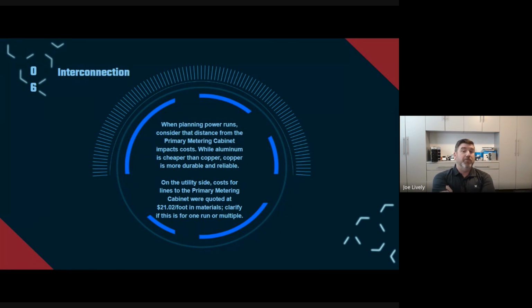So now if you're at $80 a foot for the run and you're going 250 feet, what is that, 20 grand? Now you're also asking, how far am I from the substation? If I'm 900 feet from the substation, how does that work? These costs really start to add up. So knowing how you're going to position yourself, and finding a spot that's maybe closer to a substation, or having your equipment right next to the junction box, will reduce the cost of building out your site.